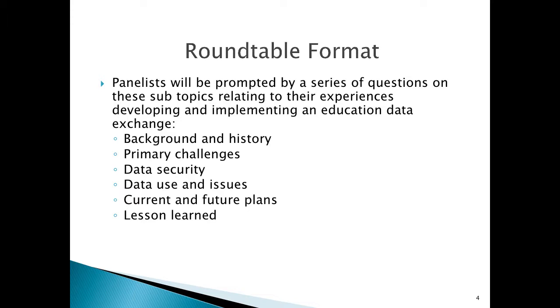We have a release meeting every couple of months or so, where we're usually two releases ahead, and we define all the changes that are going to go in, unless there's something that's really high priority where we have to have emergency releases. All of those change requests from Kentucky Department of Education and from our child welfare side are matched up, prioritized, and applied to releases as they go forward. And New York, what might you have to add to this discussion?